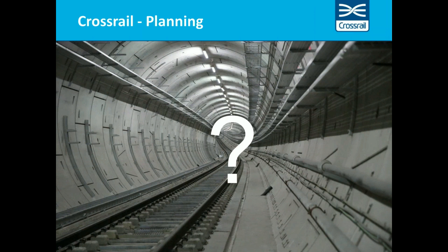How do you measure progress and value? Okay, in some cases that is very easy. In other places it becomes very difficult and is much more subject to opinion and judgment. So when we're measuring track progress, that's pretty easy. We have to install sleepers and rail and do all that, but although we do measure that, it's quite easy to measure it. In terms of a useful metric to our senior management, what we decided was we'll measure the track when it's finally concreted in. So that's the measure that gives our senior management a pulse on how we're getting on in terms of progressing the project.